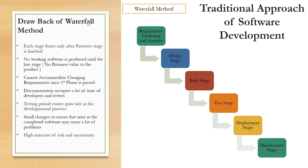Now there are many drawbacks in the Waterfall method. Each stage starts only after the previous stage is finished. No working software is produced until the late stage, meaning no business value until the last stage. It cannot accommodate changing requirements once the first phase is passed. Testing comes quite late in the development process, and small changes or errors in the completed software may cause a lot of problems. This method involves a high amount of risk and uncertainty.